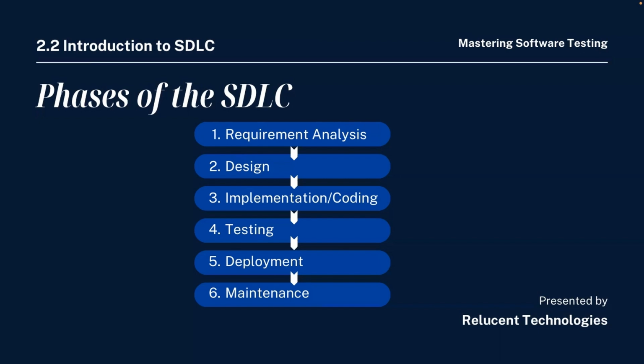In this phase, the developers write the actual code based on all the requirements, based on all the documentation that's been produced so far, and the design and everything. They also conduct unit tests. Okay, we're going to talk about what unit tests are, but it is the lowest level of testing to ensure the code works as intended. And the main outputs of this phase are the source code, unit test results, and code review reports. Because the developers write code, they test their code, that's unit tests, and the developers also review each other's code, that's code review.